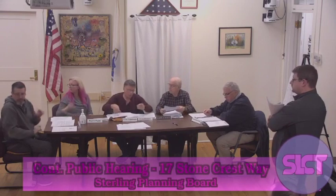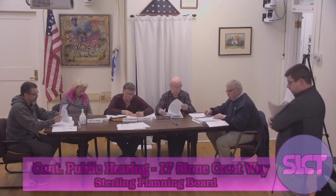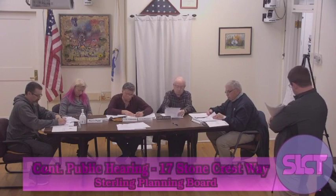Mr. Chairman? Yes? Did you want to add a condition about submittal of an as-built plan? Yeah, so that'll be 17. So 17 will be that the applicant will provide an as-built plan at the completion of the project to the Planning Board.